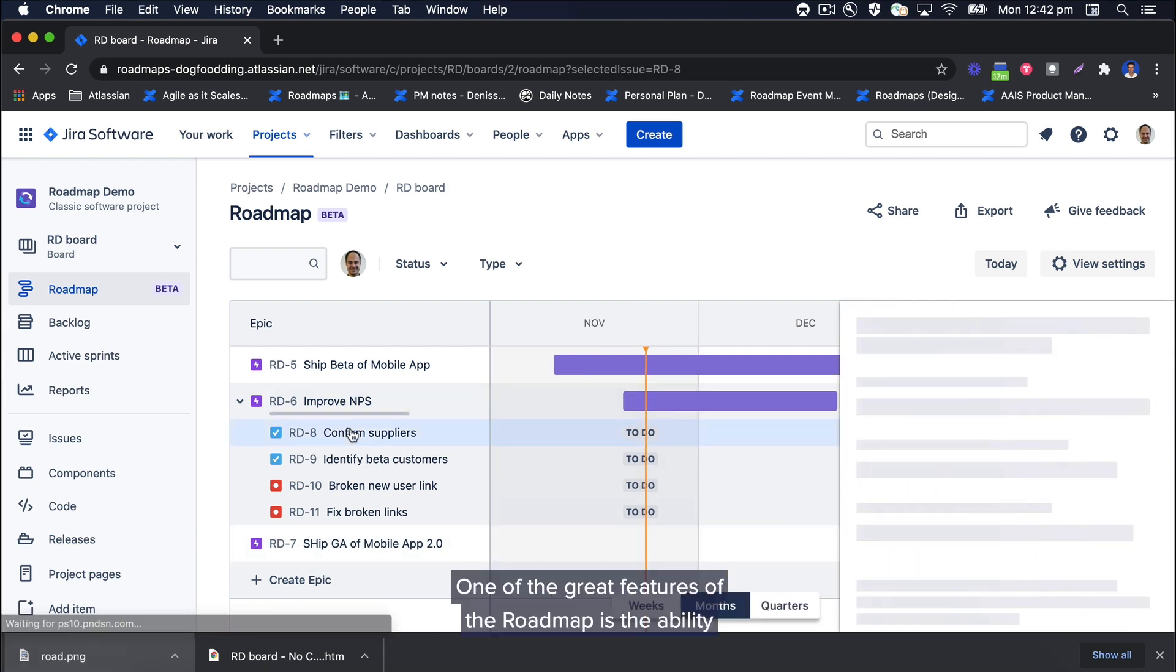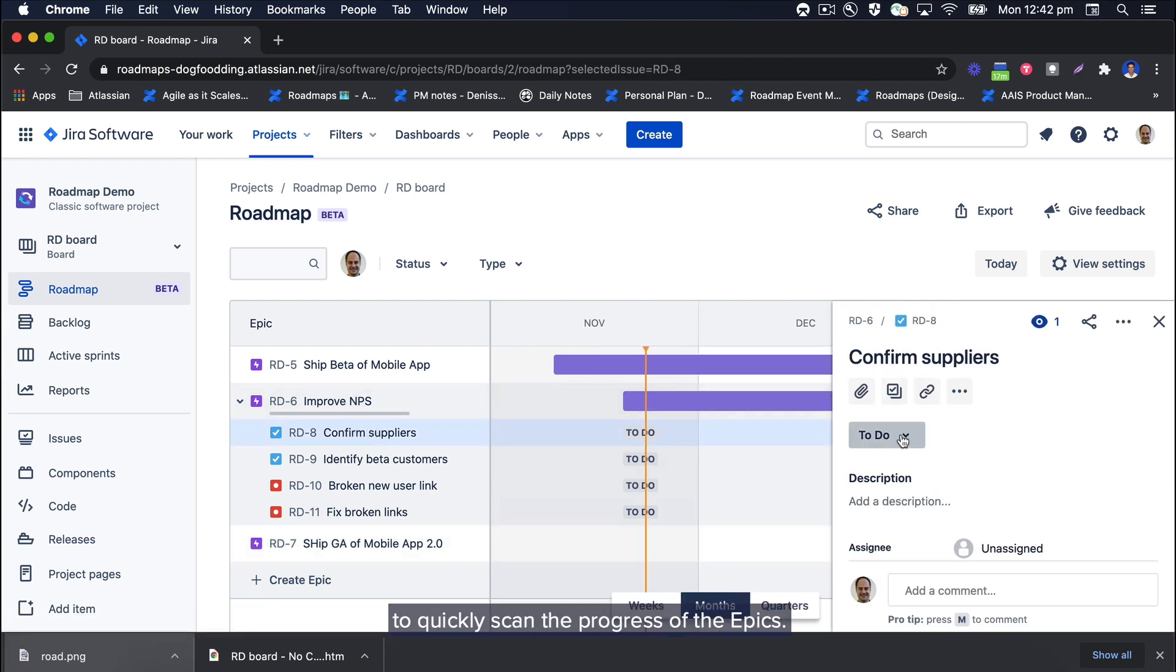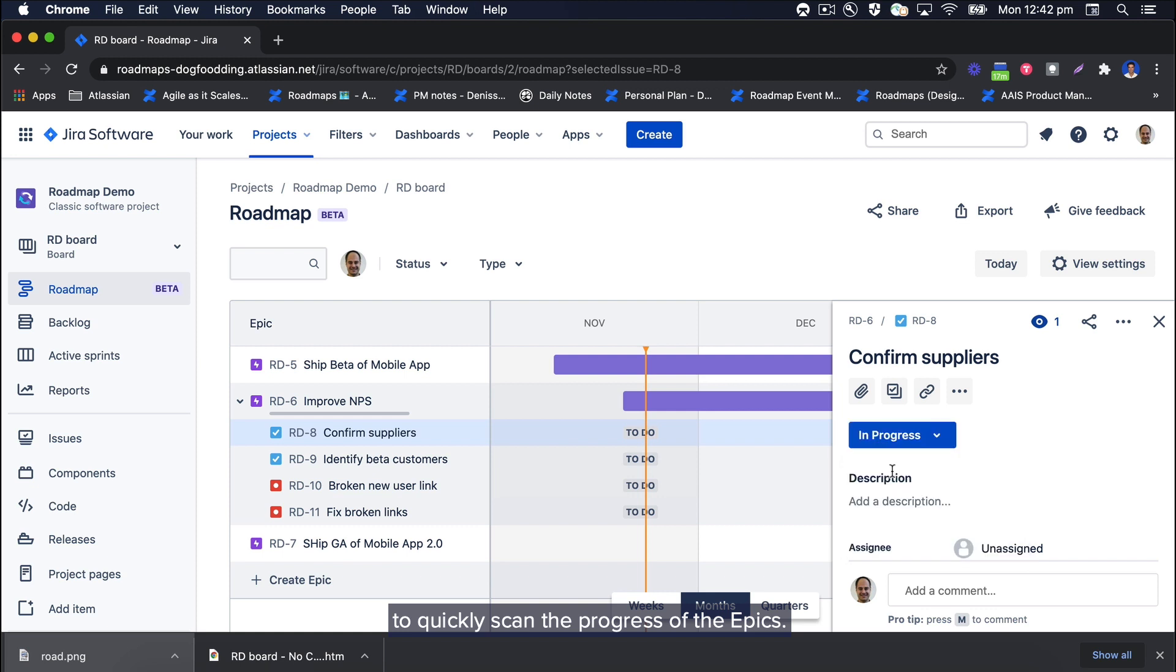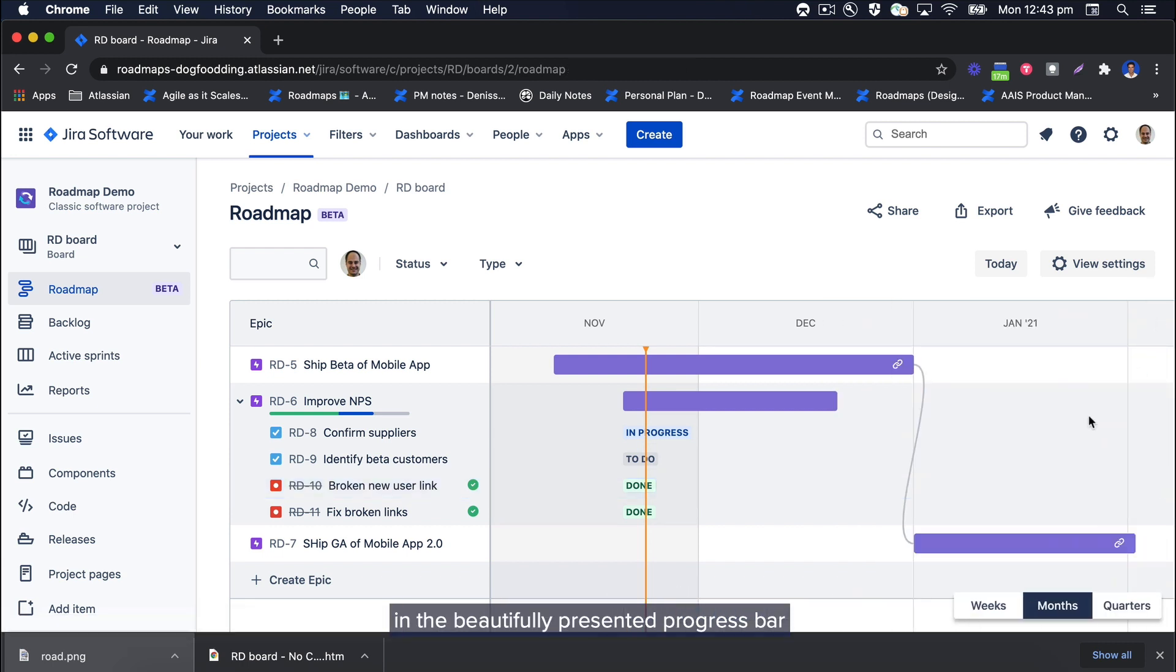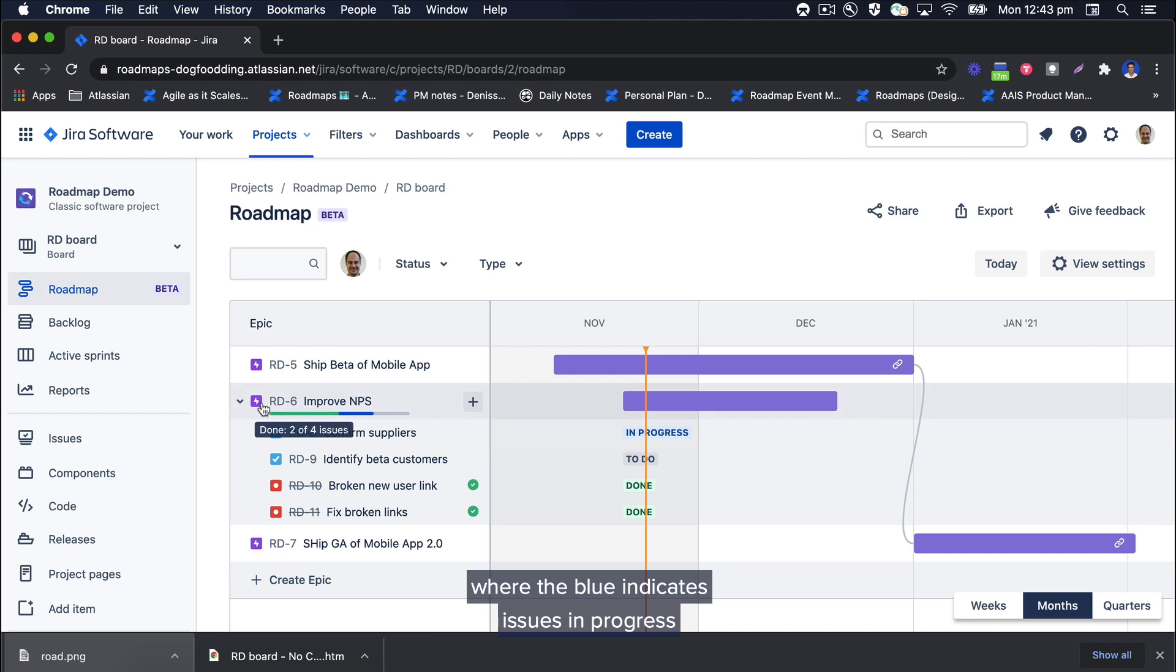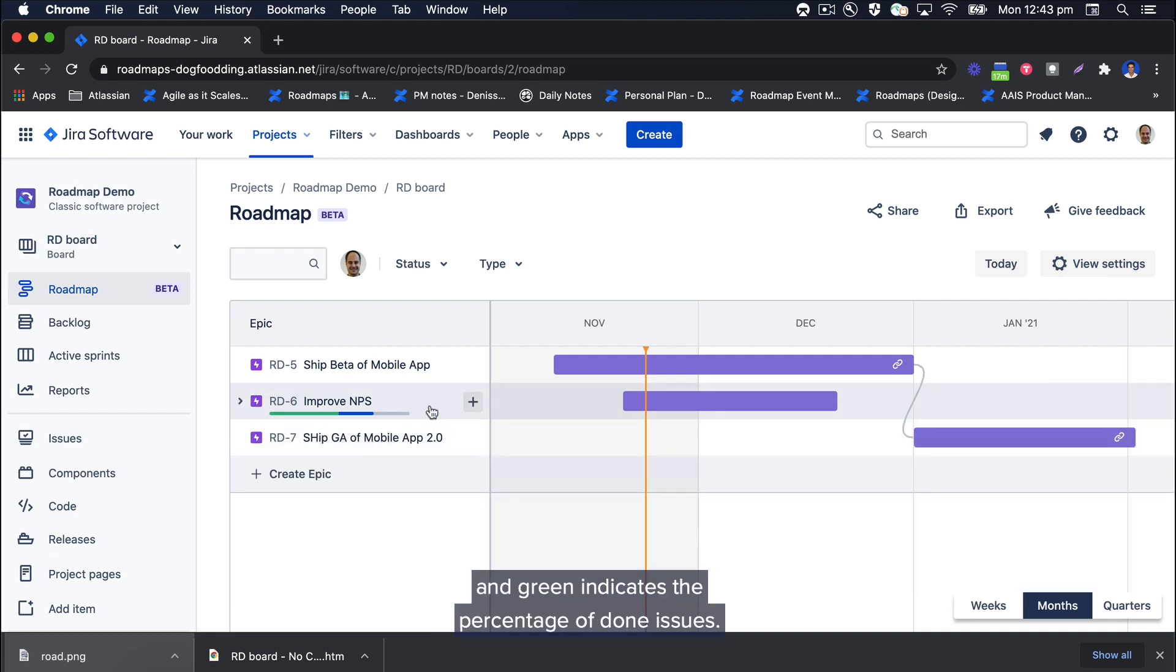One of the great features of the roadmap is the ability to quickly scan the progress of the epics. As you can see, I have changed the status of the epic's child issues, which is reflected in the beautifully presented progress bar, where the blue indicates issues in progress and green indicates the percentage of done issues.